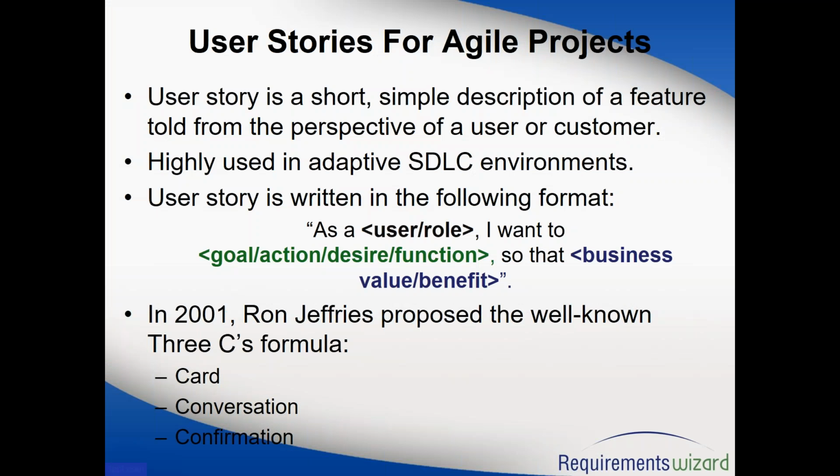And on the back side of it, people used to write the acceptance criteria. That means, how can anybody tell that this story is complete? On the back side, we would write that. So front side would contain these things, and if you flip the card, on the back side you will see the acceptance criteria, which will tell the developer when can they say that this story is successfully done or coded.